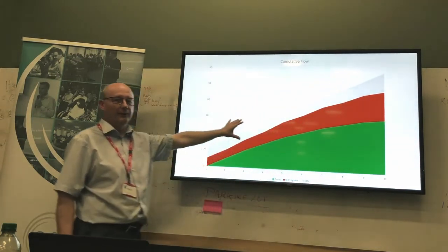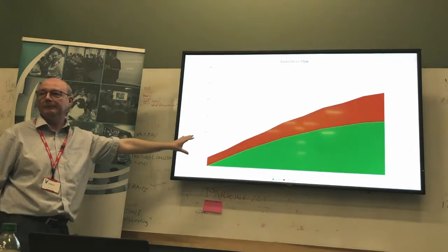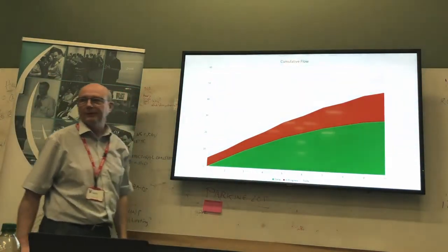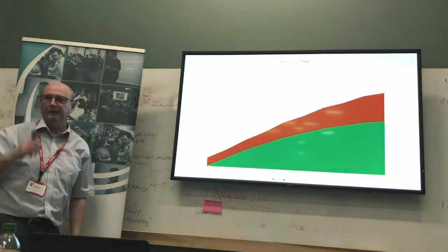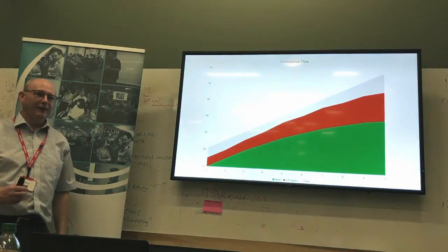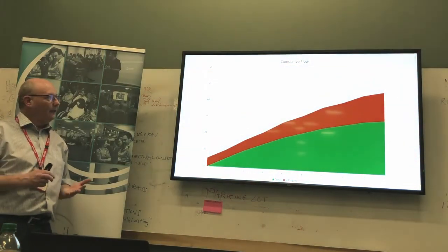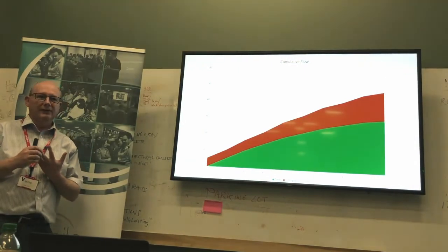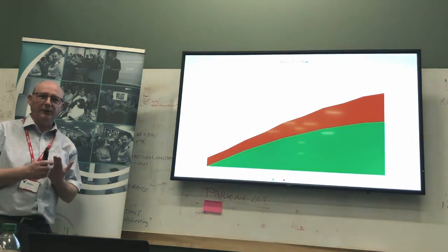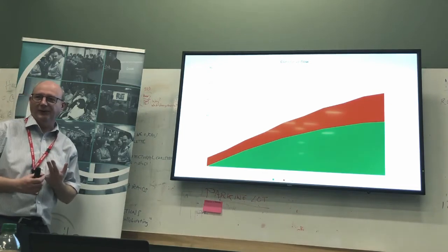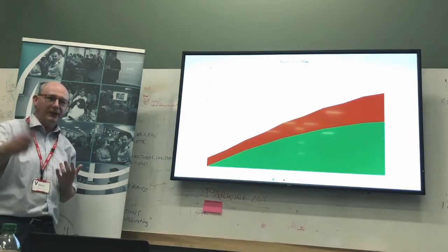I've seen this in real life. That happened here as well. The problem is that the more work in progress you've got, what have you got? You've got more task switching, which means more waste. So if you insist on starting stuff at a certain rate, the more you don't finish, the more task switching you get, and the more you don't finish, and the more task switching you get, and the more you don't finish. We could go on for a while.